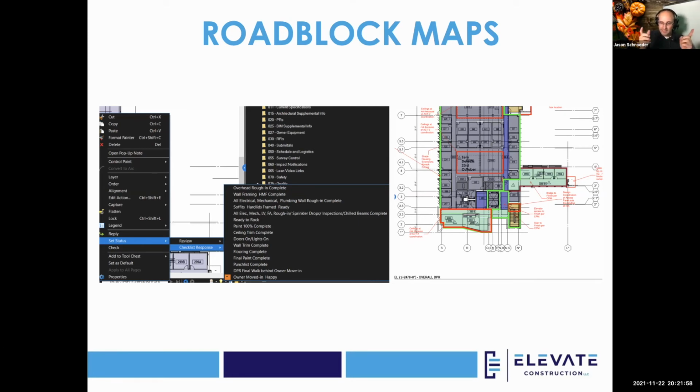And we had a separate crew with separate foremen manage those change areas. And they were, if we could fit them into the schedule, finished on time. But if we knew that we couldn't fit them, we detached them from the schedule and we were transparent with the owner immediately. Now, here's the big secret to construction. Most of the time when people say, well, owners won't let you, or they won't accept this, or I can't talk to them, 80% of the time it's BS. Owners are realistic as long as it's visual and as long as you can do this with them in a partnership. And so we mark it in red and we say, okay, we can scrum this. And I'm being serious because that's what you do.